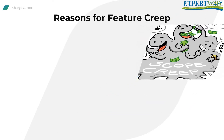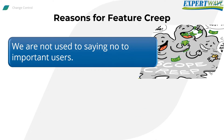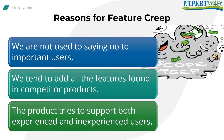Feature creep happens for three reasons. One: we're not used to saying no to important users, so all user demands end up in the product. Two: we tend to add all the features found in competitor products — I fell for this trap myself in my early years and ended up releasing the product very late. Three: the product tries to support both experienced and inexperienced users, so we may end up with two ways to implement the same functionality.